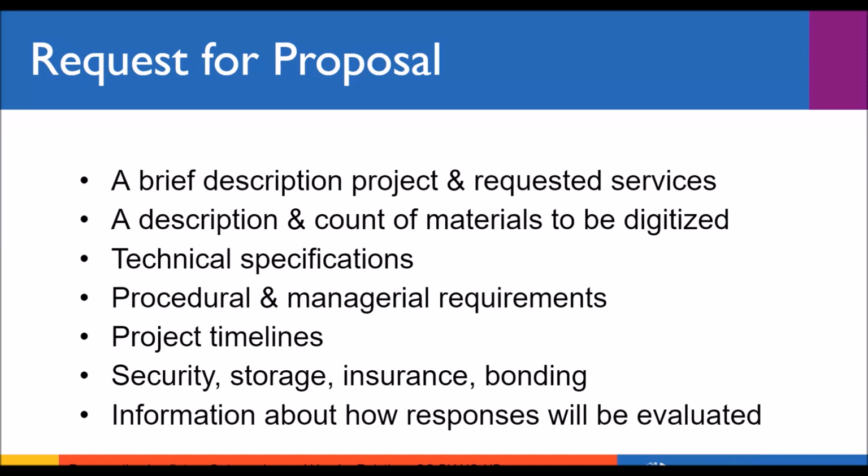You also want to include any sort of security, storage, insurance, and bonding requirements, especially if you have maybe moldy material or audiovisual material. You'll want your material to be in cold storage while it's in the vendor's care, making sure that they can properly care for the material while it's in their possession. Same thing with security. What's their security like? Are your materials, which are likely irreplaceable, going to be safe and secure?